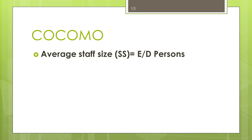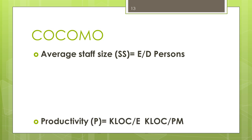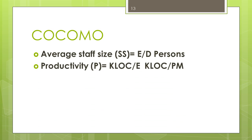These are additional expressions used in the COCOMO model. Average staff size is equal to E divided by D, where E is the effort and D is the development time; the unit of average staff size is persons. Productivity P is equal to KLOC divided by E, and the unit of productivity is KLOC per person-month.